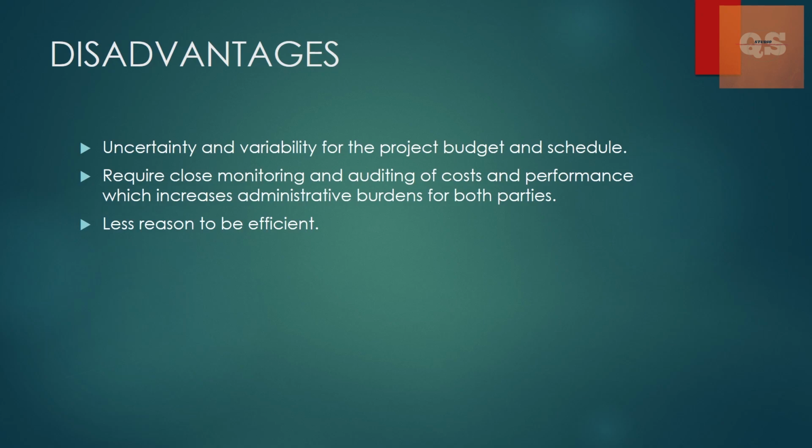And then there is less reason to be efficient, so that is another major disadvantage. Since the cost is not determined, there is a possibility that the contractor might not be very efficient. They might not stick to a particular time frame to complete the project since it is flexible. So that can be a risk to the client as well.